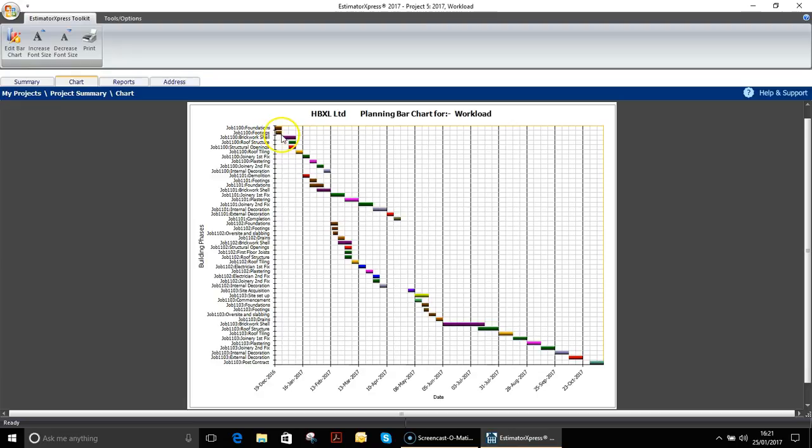And we can see that I've got one job starting and finishing here. This job here starts part way through, another job starting when this first job finishes, and I've got a large job here which starts when the others have all finished. So in its simplest form, this is a nice overview chart of all your projects over a period of time. This of course is helpful to make sure that you're planning for correct employee numbers and also things like plant ordering.